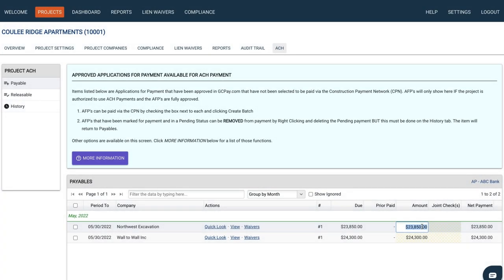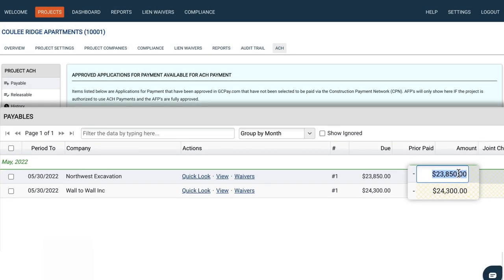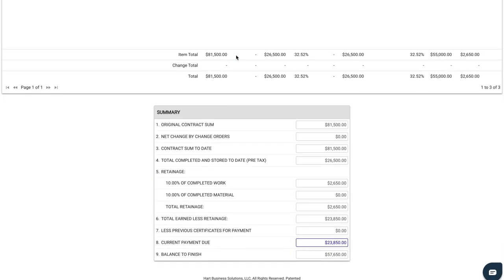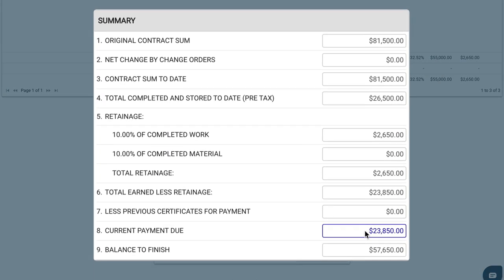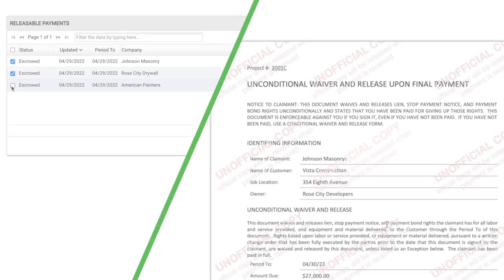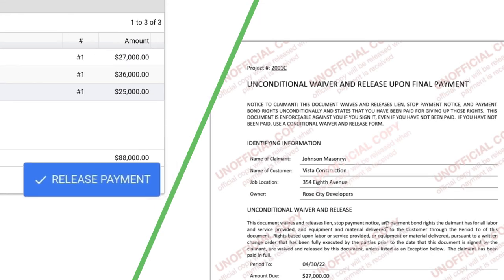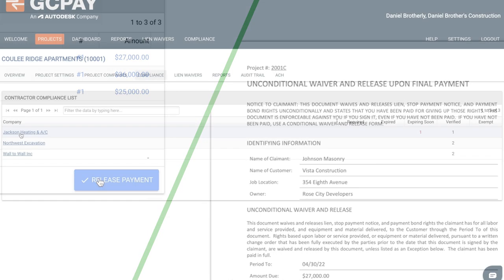With GCPay, you can easily manage electronic payments, including changes to payment amounts so that you know what's been billed, what's billing now, and what the remaining balance is. Lien waiver status, so you can make sure your subs get paid and you collect the lien waivers in real-time, keeping the project moving forward.